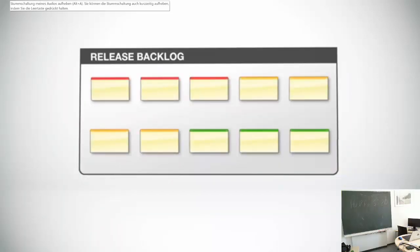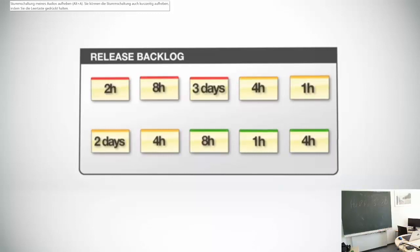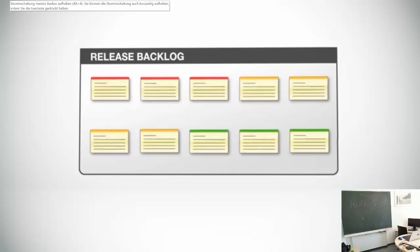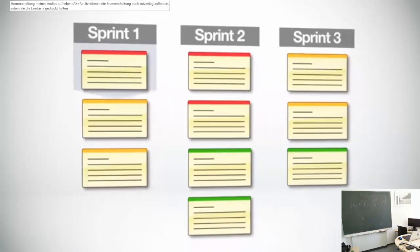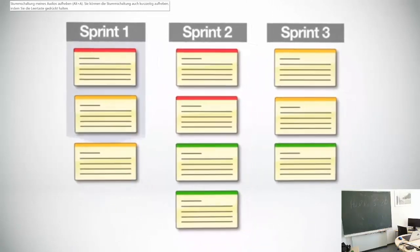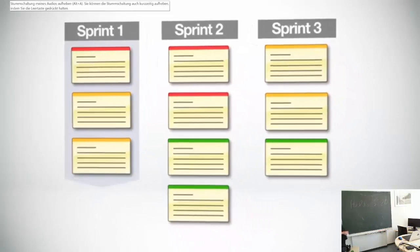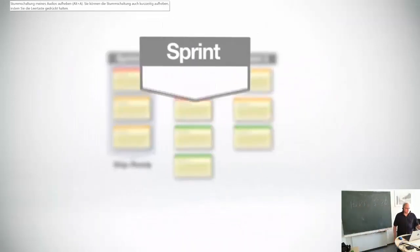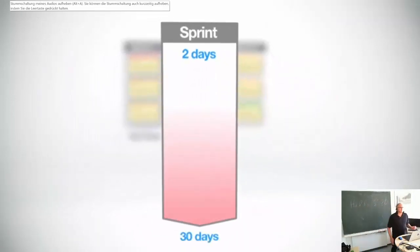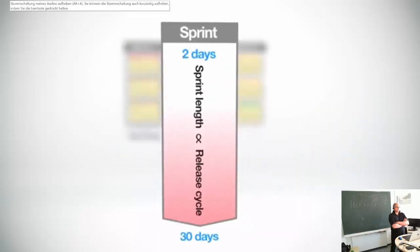With a prioritized set of user stories and the estimated amount of work at hand, we're now ready to plan out several sprints to get the work done. Sprints are short-duration milestones that allow teams to tackle a manageable chunk of the project and get it to a ship-ready state. Sprints generally range from a couple of days to as much as 30 days in length, depending on the product's release cycles — the shorter the release cycles, the shorter each sprint should be. You'll want to have at least two to as many as a dozen sprints in a given release.